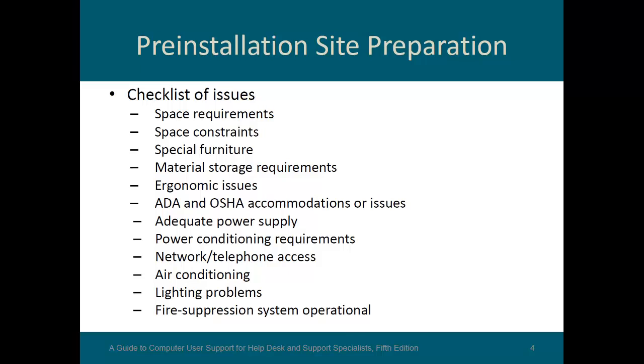Pre-installation site preparation checklist: space requirements, constraints, things that would keep it from working the way that a user would want, special furniture that may be required, material storage requirements, ergonomic issues, ADA and OSHA accommodations or issues, that's for compliance, adequate power supply, power conditioning requirements, network telephone access, air conditioning, lighting issues, and fire suppression systems.